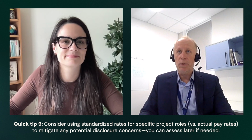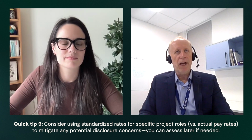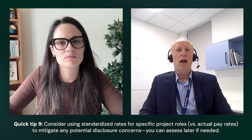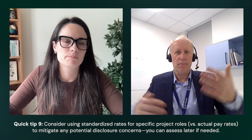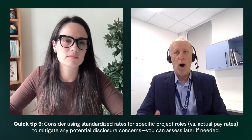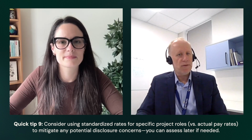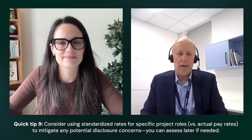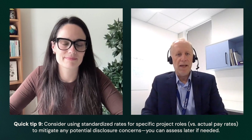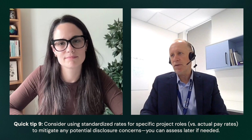There is options there to include specific pay levels for your costing side. I didn't go down that road. One of the reasons is, I guess, when you're starting that integration, the fear level of having people's pay in the system just ramps up a little bit. So until we've got real confidence around the permissions, how it works, what I've gone with is more of generic charge out rates, and that's associated to the person with that role. And that's fine, that's working. It's 90% there. We're not using Bridgit for a profit and loss statement, so you don't need to go down to the cents. It's really to give you that insight and really good estimations of your costs.